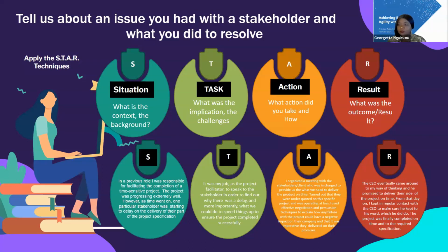And they were open to bring us to an out of cycle meeting so that we can discuss the alternative and be able to add that element that was missing on the release note. And also we were able to pull out from the release window so that the release was scheduled for out of cycle. And that's how we were able to successfully release to the client, even though we didn't release within the window, but we were able to release 2 days after the production release window.